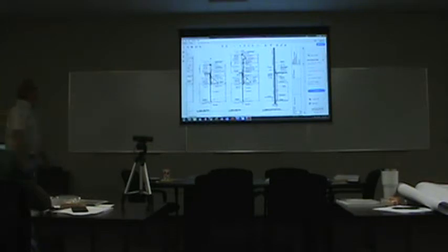Does that make sense? Okay. So sheathing, flashing, masonry, block are all related activities. One is dependent upon the other. What is that painting dependent on? The block's already up because that was previously in our schedule, right? We completed that activity. We've done our blocking and so forth. So we come down. I got to have the back wall done. I got to have the roofing done. Sheet metal on. Now I can do that. You see? Walking through, taking it apart.